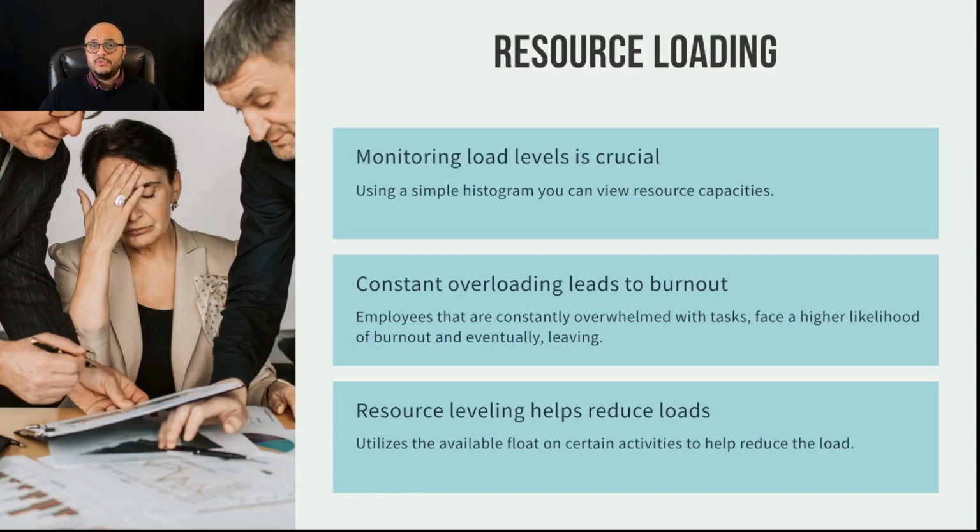A tool that you can use here is called resource leveling, and it helps you reduce loads a little bit. So you can examine the float that you have on an activity. Remember when we talked about float in scheduling? You can say, for example, activity A has a float of 5 days. If it has a float of 5 days and Mike has been working 15 hours a day for the past month, let's get him to slow down a little bit, okay?